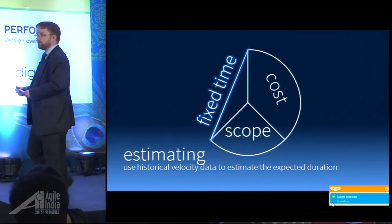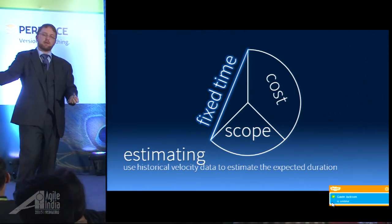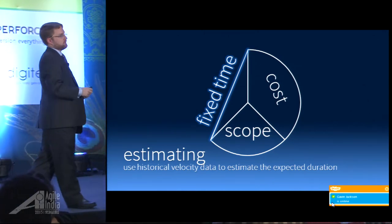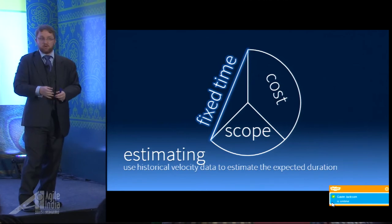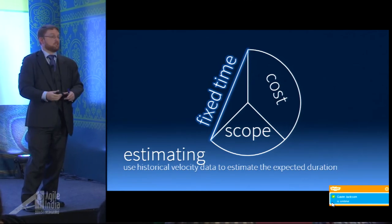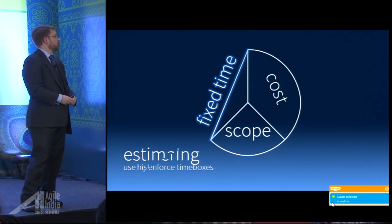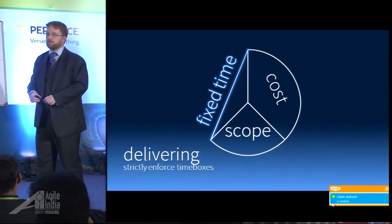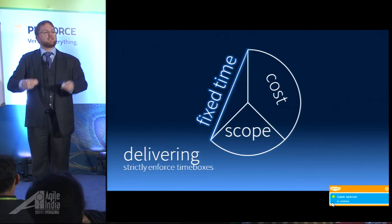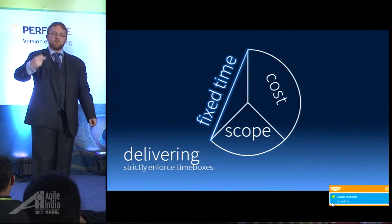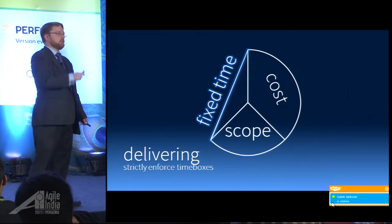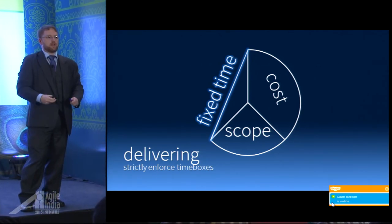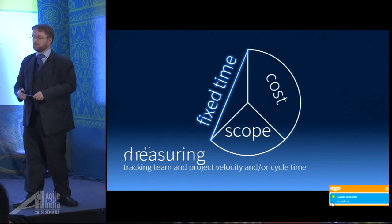If it's a new team, or the team is fundamentally changed — you pull out three members and put another three in — you do not have historical velocity data. At that point you just take a guess, because you've got nothing else to go on. Where it is fixed time, make sure you strictly enforce time boxes; don't let any sprint overrun. The more things that are fixed, the more agile you need to be. The more you deviate from good agile practices, the harder it will be to maintain.